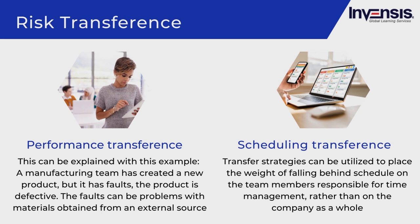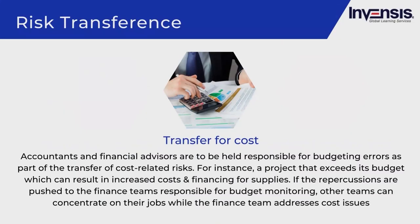Scheduling transference places the weight of falling behind schedule on the team members responsible for time management, allowing the production and design teams to concentrate on finishing their remaining tasks. For cost transference, accountants and financial advisors can be held responsible for budgeting errors, so that if a project exceeds its budget, production managers and team members can concentrate on their jobs while the finance team addresses cost issues.